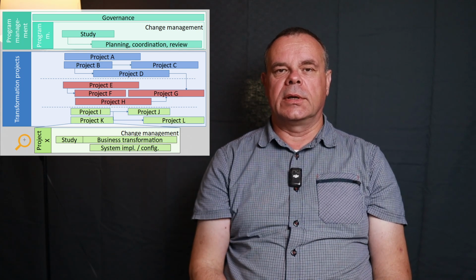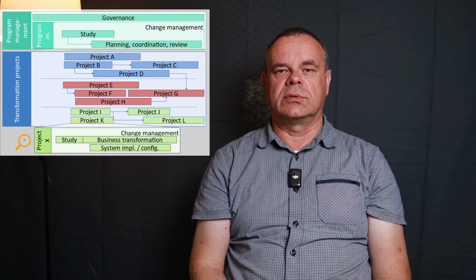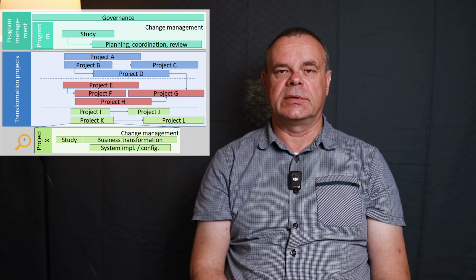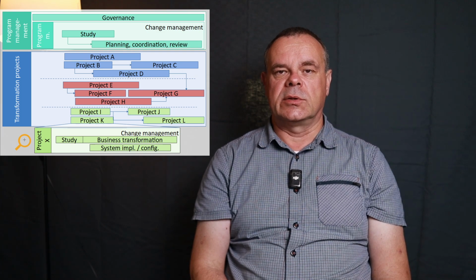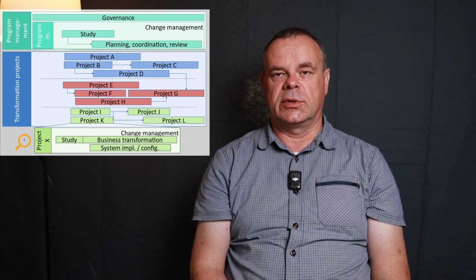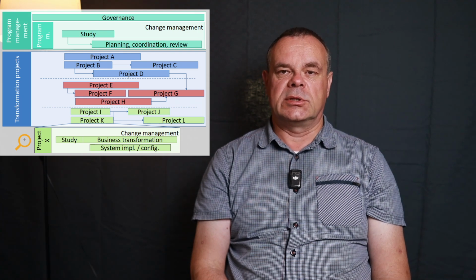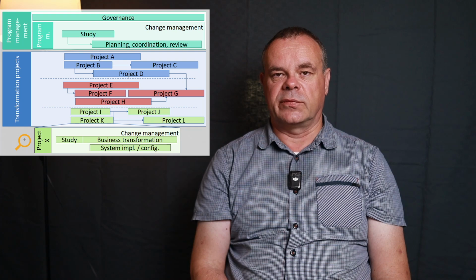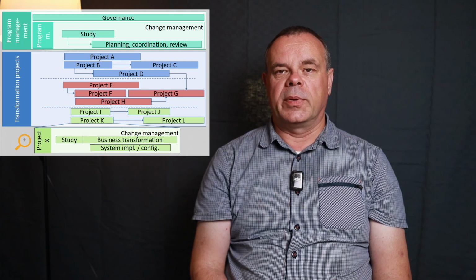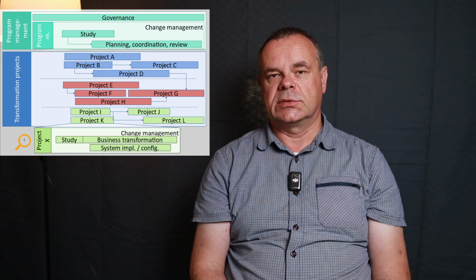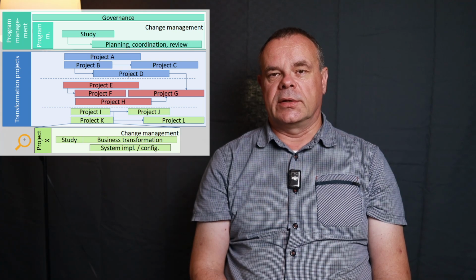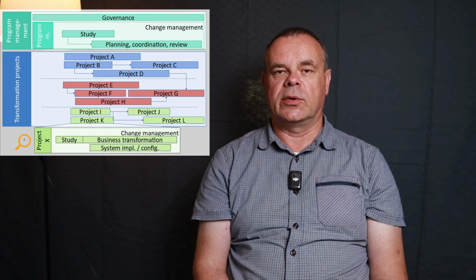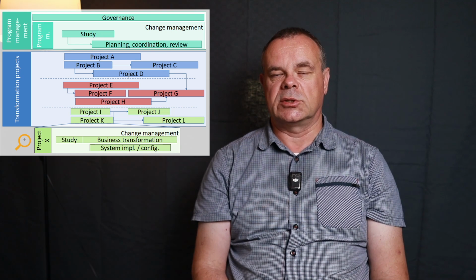The program planning and governance project also has a project organization and the project manager responsible for maintaining the roadmap, starting projects, capturing lessons learned. Its project organization also acts as a professional planning and advisory staff for the program, preparing high-level management decisions. If the organization is large enough, its digital transformation initiative may also deserve its own project management office.